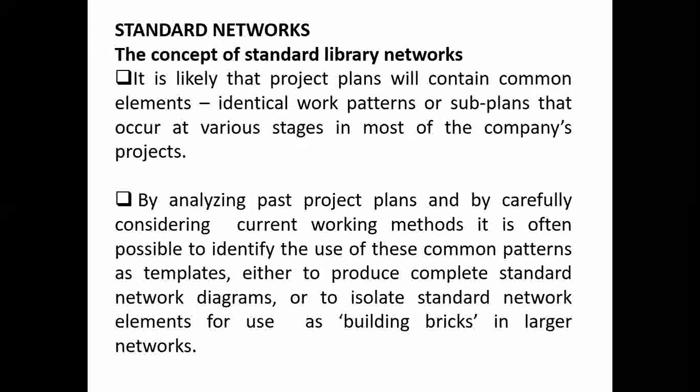But since you have done these networks several times for so many different projects, you'll be able to just make changes to those previous projects to suit the current projects. And this is what you are calling the concept of standard library networks. So you must be able to keep a record of previous drawings, because in this way, you will discover that